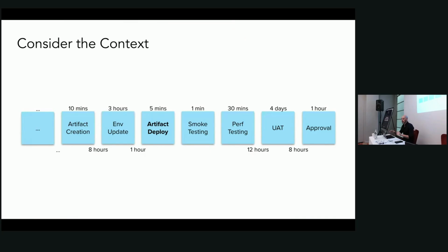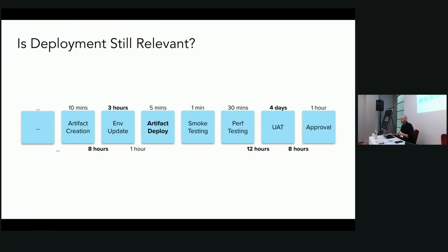And what happened was we mapped out this entire value stream, and it turned out that we had different areas that were more consequential than simply deployment. They didn't like the fact that there was a manual process where they had to ping somebody on Slack and ask them to deploy something, and somebody would type in some command. But it turns out that that was actually a small piece of the puzzle. Even though it was interruptive and manual, it could be easily automated without some complicated tool. We didn't need $20 million.